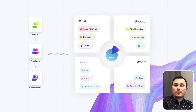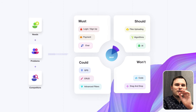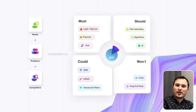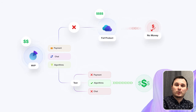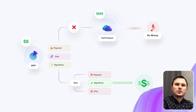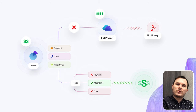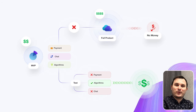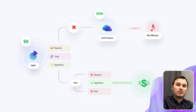Once you've done a deep dive into customer needs, pinpointed all customer problems, finished competitor research, and come up with software solutions, it's time to properly prioritize your software features to create your MVP. You have to figure out which features are must-haves, should-haves, could-haves, and won't-be-developed. This approach gives you a solid game plan for essential features without busting the budget, lets you pivot as necessary, and helps crystallize your project's main objectives. You will likely need to pivot a few times until you find a solution that suits all your users' needs — that's why limiting features for the MVP is so important.